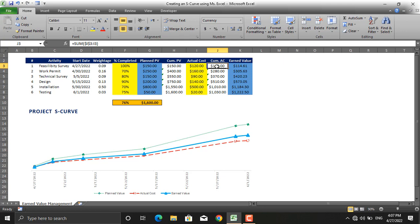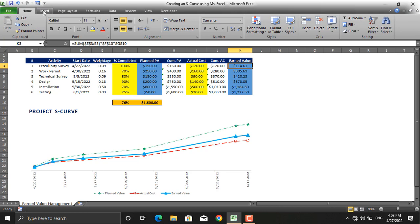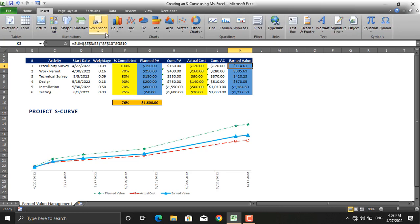Next thing is cumulative actual costs. For cumulative actual cost, the formula is the same as for cumulative planned costs. And the last one and the most important one is the earned value.